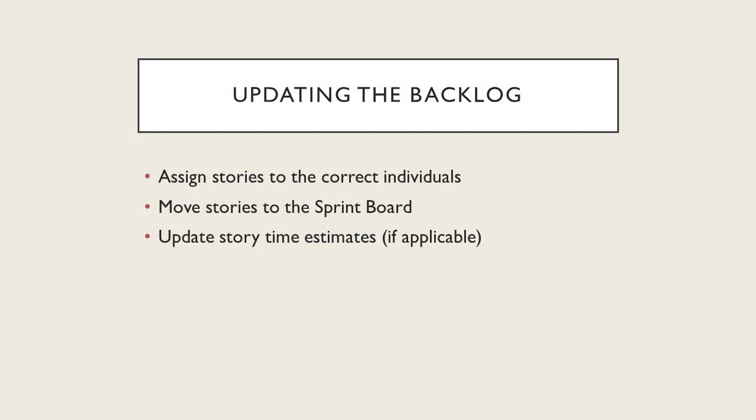So, for example, a baseline story may be 4 hours and require resources from 2 different developers. Now, a story that would be 8 hours may be called a large t-shirt size then, based off of that baseline. Now, this can be a complex technique and maybe a little bit ambiguous at times.